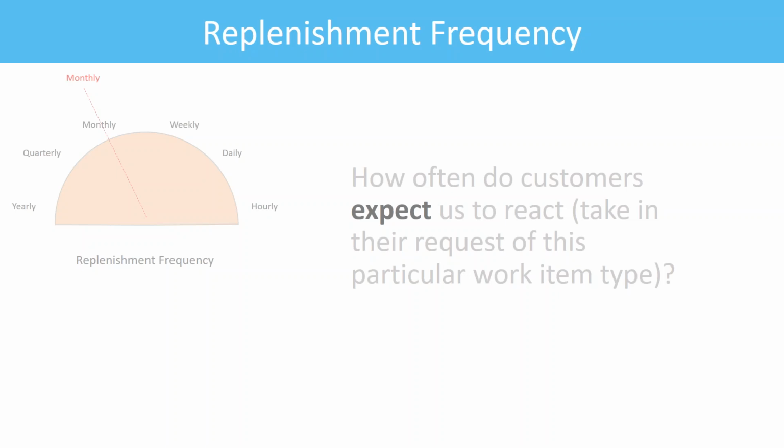So the third way of doing so is that you can just assume a number, assume a frequency, and deliver to that frequency, and see if your customer is happy or angry about it. If your customer is happy about something, they're not going to complain. And if there's no complaint, it seems that your assumption is right. Then you can continue to go on with it. But if your customer is angry about you not replenishing frequently enough, then it's an indicator saying that, okay, maybe you need to replenish more frequently.